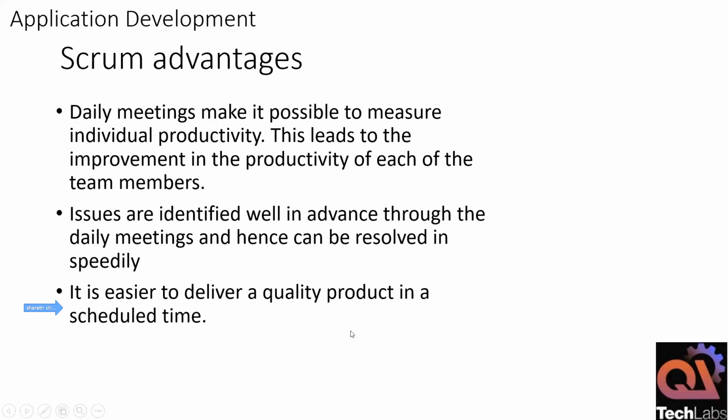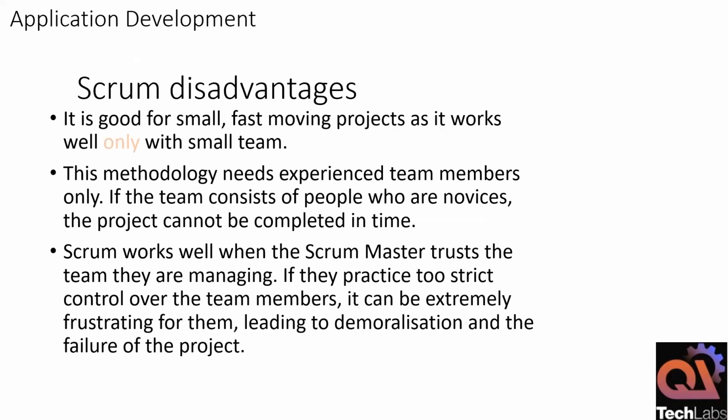Yes. So in this model, as I mentioned in the beginning, every day the team will meet for about 10-15 minutes. There are teams who preach Agile in a wrong way, but the typical thing is you brief very shortly on the list of activities you have in hand, what you are going to achieve today, and what roadblocks you have and from whom you need help. If you call out, the Scrum Master will be able to identify your roadblocks, and he will push the impediments that are required to solve your problem, right?